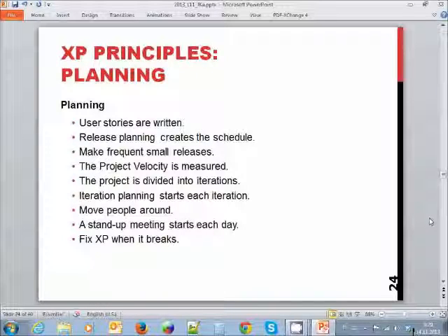And if we find problem with our approach, people think that the iterations are too long, iterations are too short, the user stories are not clear enough, or that the requirements are not clear enough, then we can just change things. If our developers say that we are using week-long sprints or week-long iterations, and the Friday is usually just spent playing video games and drinking beer because everything was done by the Wednesday evening, then we can shorten the iteration by a couple of days.